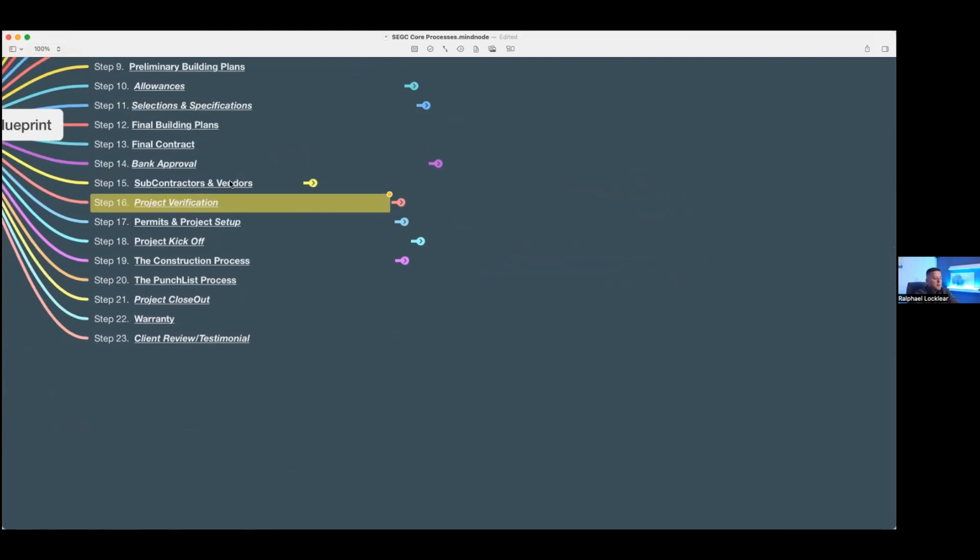Now that we've got the subcontractors and vendors who are on budget, who are on the same page with us, doing things the way that we do it, how much easier do you think it is to manage those jobs when you've got all your subcontractors going out there, letting you know when they're there, if there's a problem? You can't be on a job site 24/7, even though that might be the expectation. It's just not possible. But you've got your team that documents everything the same way we do, and they're covering their bases. And if there is something off, they're sending a video explainer, pointing, showing, just as if you're standing right there with them, and you may be 3 hours away. And you're able to say, well, no, hey, shift it over 3 inches and then stand back, show the measurement, and I'll tell you if we're good.